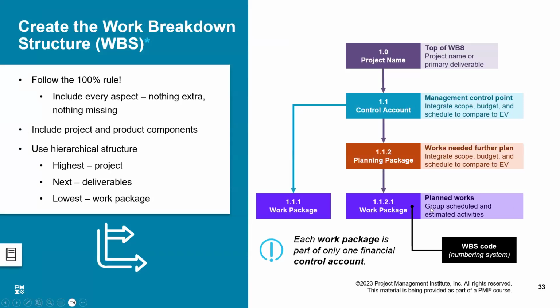Now coming over to the work breakdown structure, I don't mind if you create a product breakdown structure or a work breakdown structure until the lowest level is a work package. The upper level breakdown could be based on product breakdown or could be based on work breakdown.